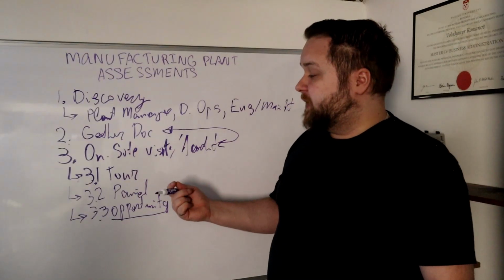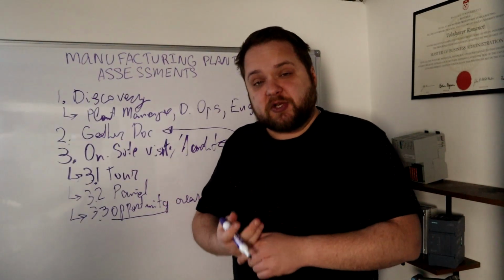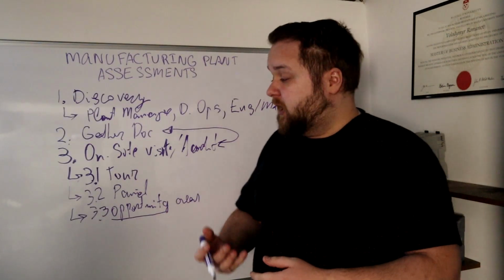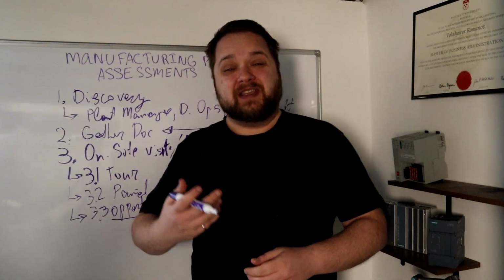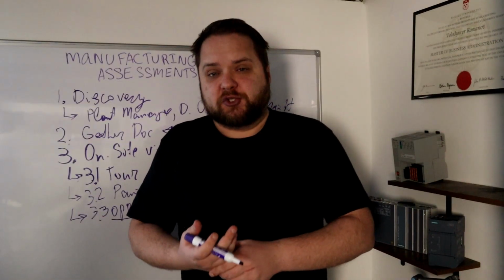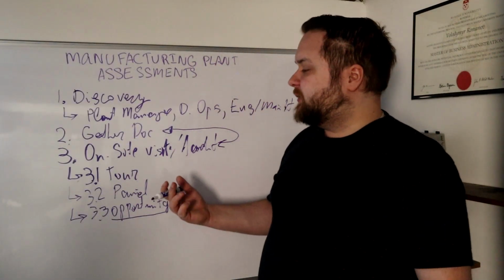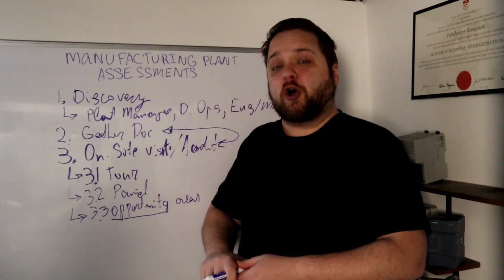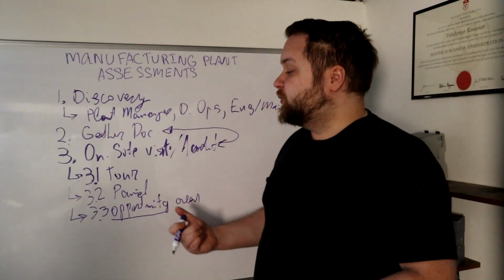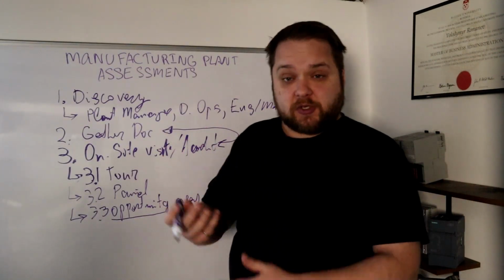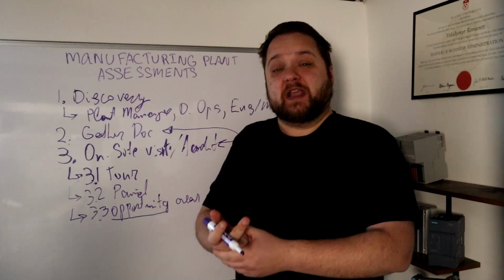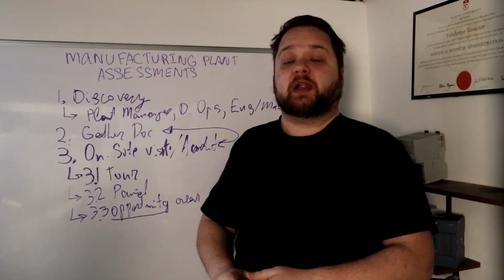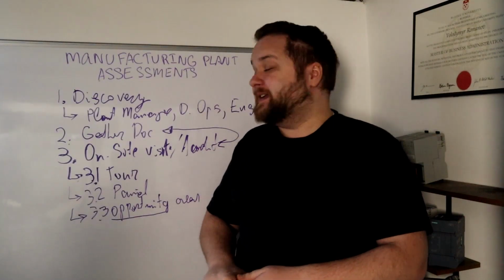While we're on site, as I've mentioned, we're going to schedule and spend as much time as we can on the plant floor, capture as much information as we can about the different areas, the industrial automation equipment, the server room. We're also going to establish some connections to people that we might need to reach if there are certain follow-up questions as we leave the site. So we definitely want to talk to the plant manager. We want to talk to the engineering manager, probably the ops manager that's in charge of the people on the plant floor and knows the operations intimately well.